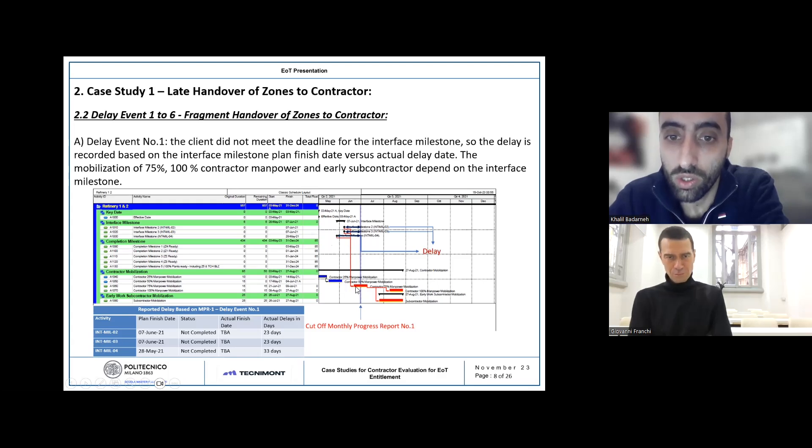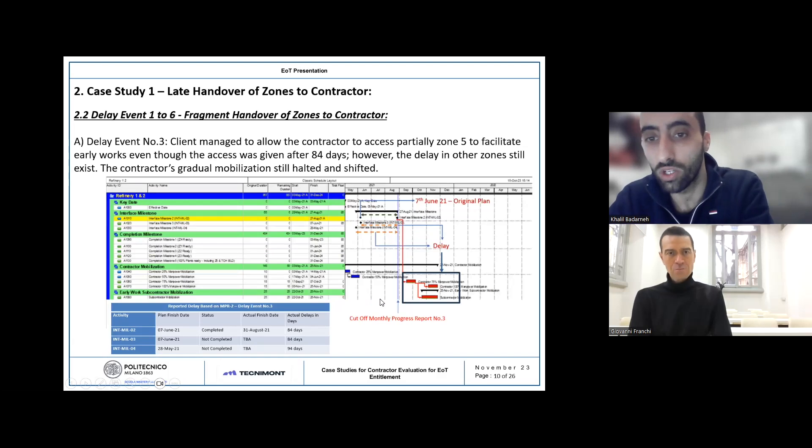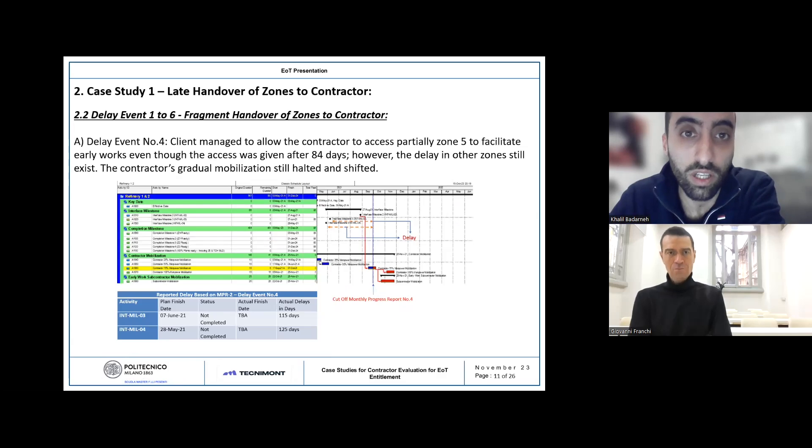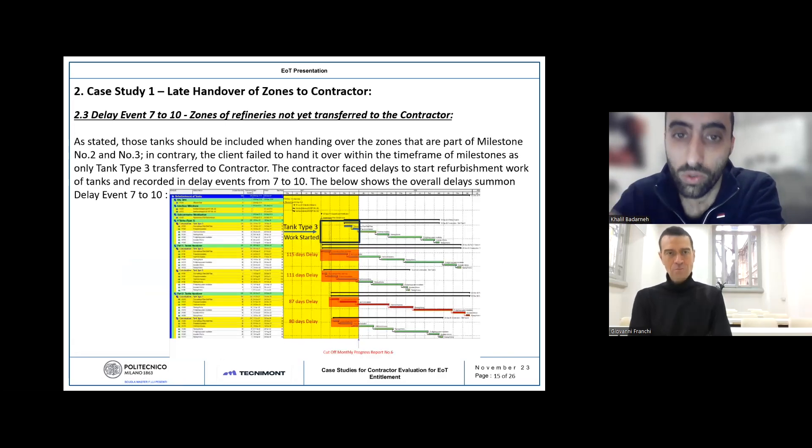So this is a delay here recorded, and we kept recording the delays in these cases where the contractor had to shift the program and recorded the delays as well. Also, we have another situation where the contractor planned his activities to proceed, but since the client didn't hand over the areas fully, we also suffered another delay.